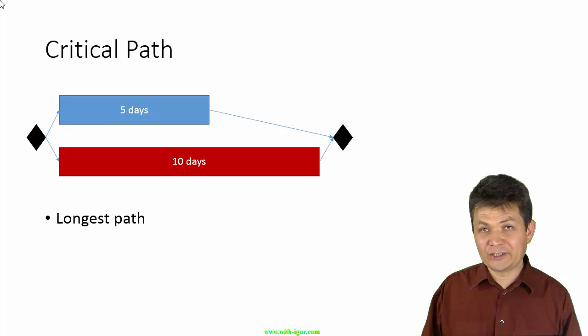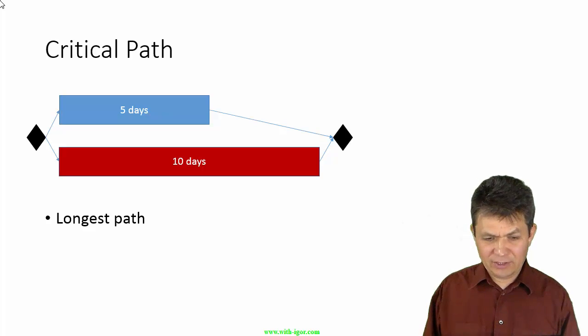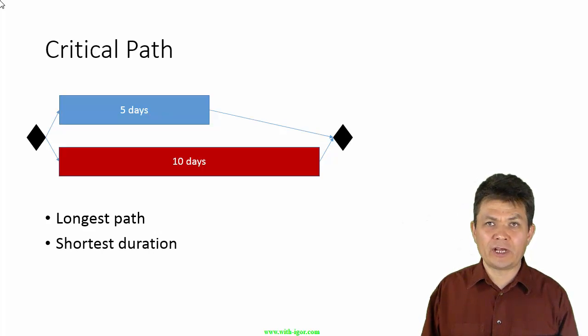Now, why is it important? Well, it is important because the longest path actually determines the shortest time that it will take us to complete the project. It is the shortest duration of the project. If you look at our project here, 10 days as scheduled right now is the shortest duration.